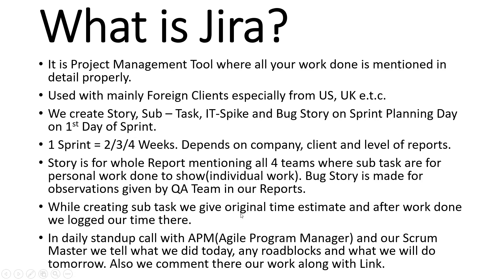For example, if there is a small Power BI report and on the first sprint planning day you estimated three days, then log three days if it took three days. If it took 3.5 days, that is also fine. If four to five hours are exceeding, no issues. But if you estimated three days and are logging six days, then you need to explain to the client why three extra days were needed for that Power BI report.